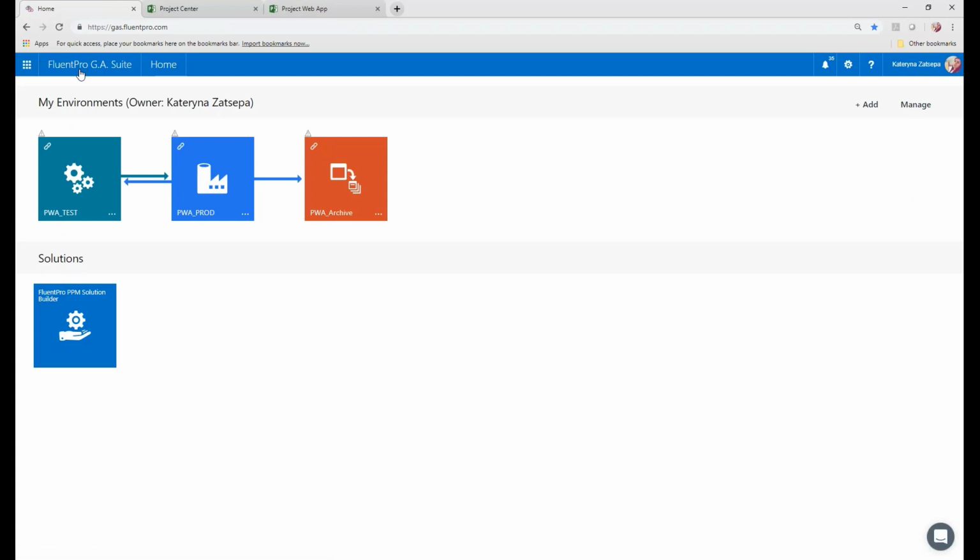And moving to another scenario, another change which was requested in our production environment. It was a need to copy project sites from production PWA to a separate site collection. So, per recommendation of Microsoft Project Online users, to keep Project Online performing at its best, there are several limits to how much data we can realistically store in the environment.